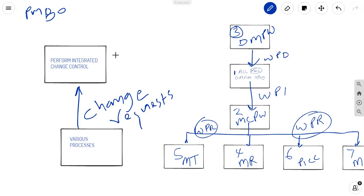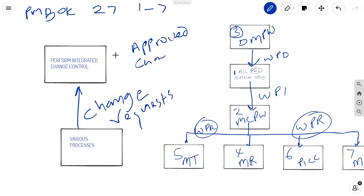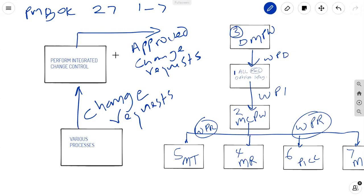So this is what we're looking at. PMBOK, page 27, figure 1-7. Right at the bottom, it shows you approved change requests. And that's all well and good, but these approved change requests come specifically out of perform integrated change control. So it says project change control in the PMBOK guide, but I want to point out that it is specifically perform integrated change control.